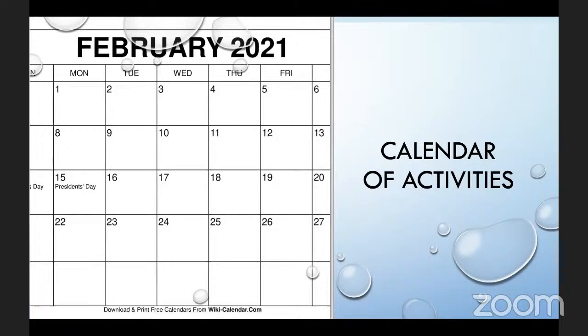So that is why the grooming session is critical, foundational, and should be a precedent to the estimation. It should happen first before estimation, right? So for the grooming session, you schedule a time again on the calendar.